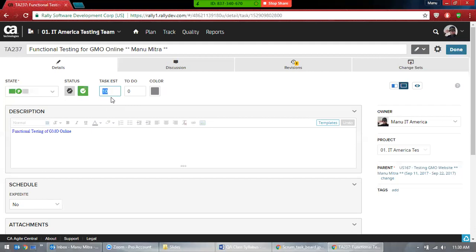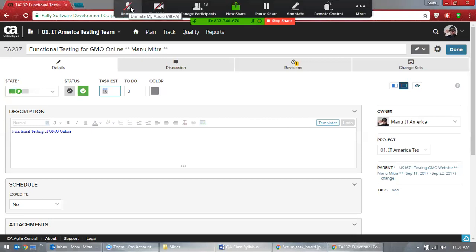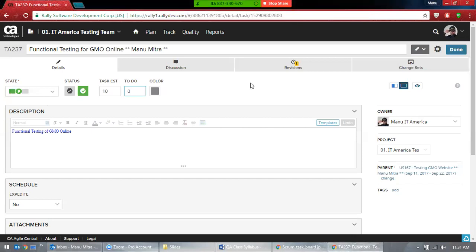Once you complete it, let's say you have 10 hours remaining, and you have completed your test cases for 3 hours. So you have completed about 3 hours of test cases, and you need to update that here. That's 10 minus 3, 7. So To Do is 7, which means you have 7 more hours of work. This is how you can update it here.